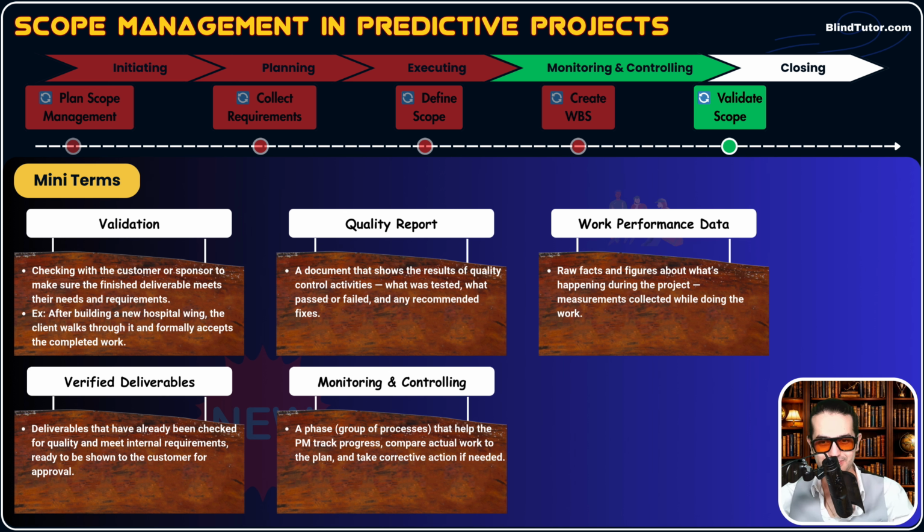The team executes the job, and then you as a PM monitor and control and compare the actual work that is happening with the work planned in the planning phase, and see if we are on schedule, on budget, and every aspect of the project. And if things are going badly, you take corrective actions to correct the deviation, to put the project on track again.